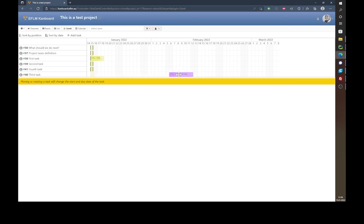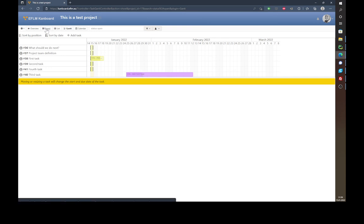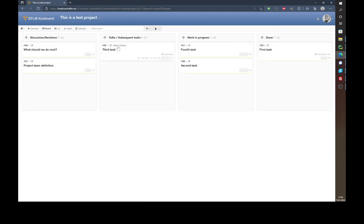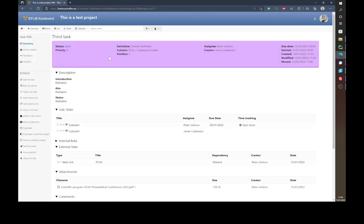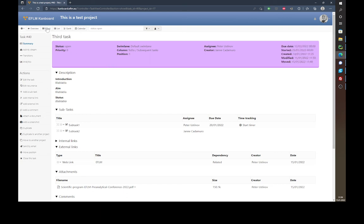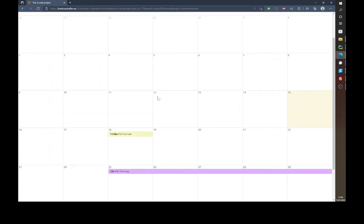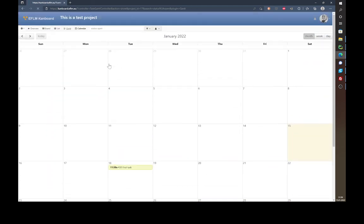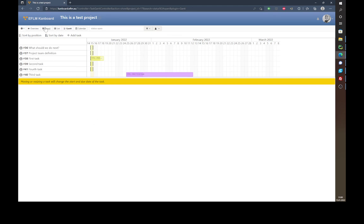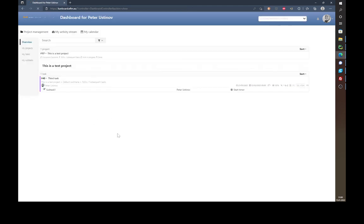In the Gantt chart view you can also move tasks around and extend them. If you do so and go back to the third task, you'll see the dates have changed as well. That is basically all you need to know as a user — the calendar view and the Gantt chart view.